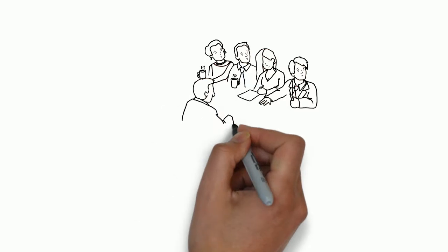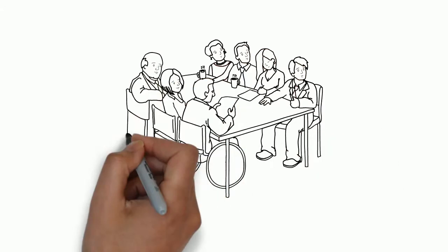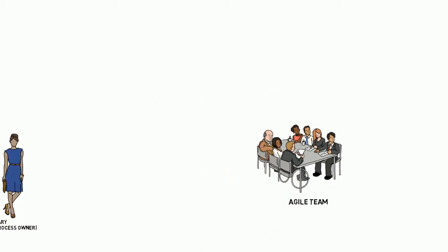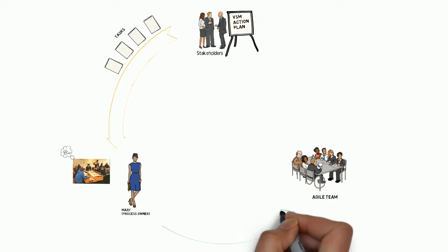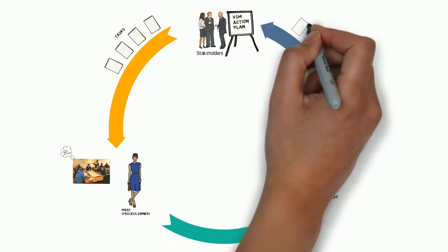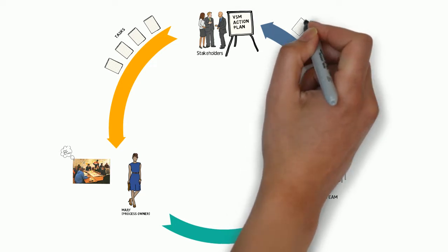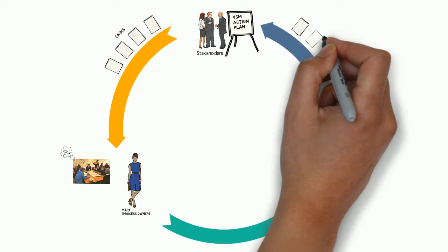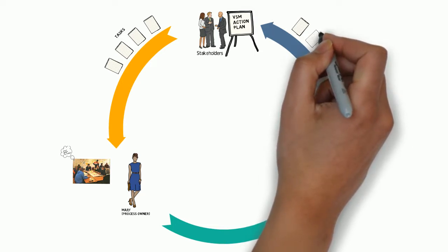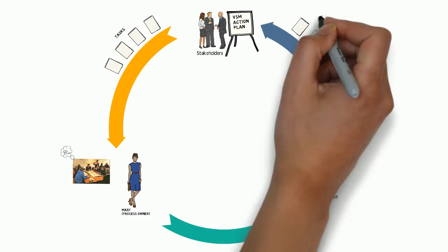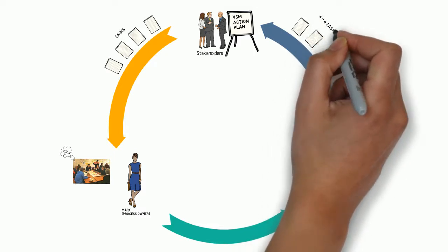Now somebody actually needs to deliver the tasks, so here they are, a small, co-located, cross-functional, self-organising team of action owners. If this is an Agile team, they don't save up for a big bang release of an improved process. Instead, they deliver tasks early and often. In this case, they normally deliver 4 to 6 tasks a week, so that is their capacity.